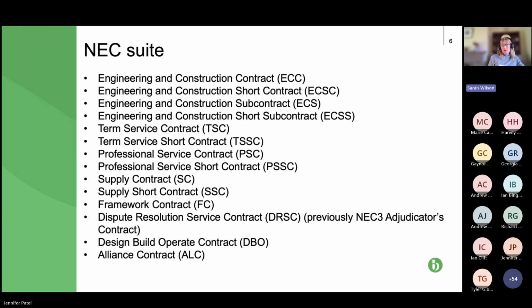It's a design and build contract with the add-on of the operational provisions after completion, presumably for a number of years. And then finally, the slightly out of the box contract, the alliance contract, which is the single contract for all the major parties, with single project insurance. It's basically a super collaboration contract, with little opportunity for claims.